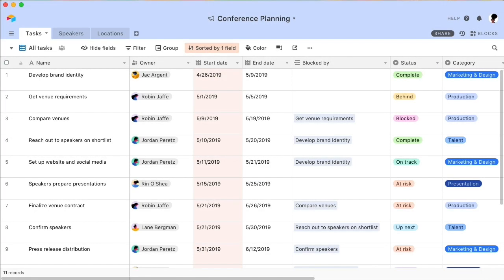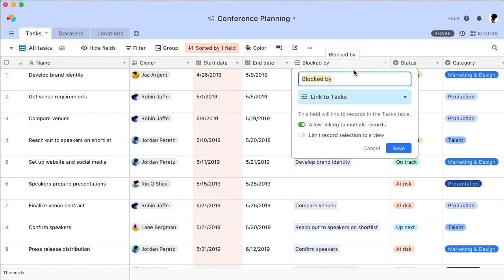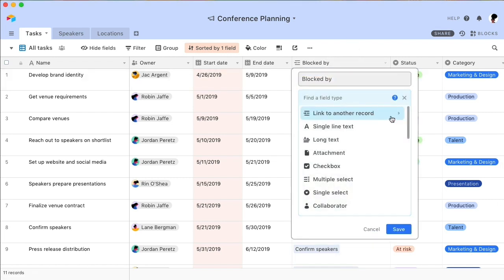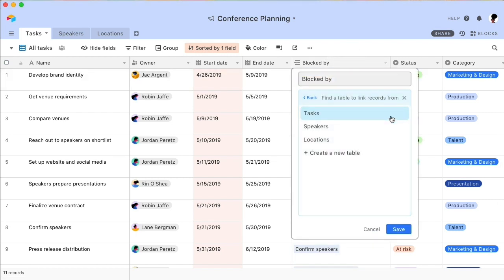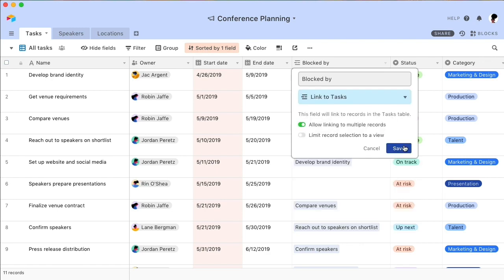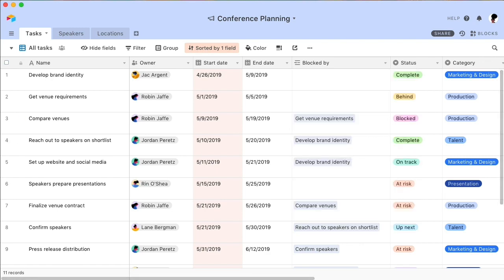If you want to add dependencies to your Gantt chart, your table needs to have a linked record field that links back to its own table. For example, if you are using a table called Tasks, you need a linked record field that links to other records in the Tasks table itself.